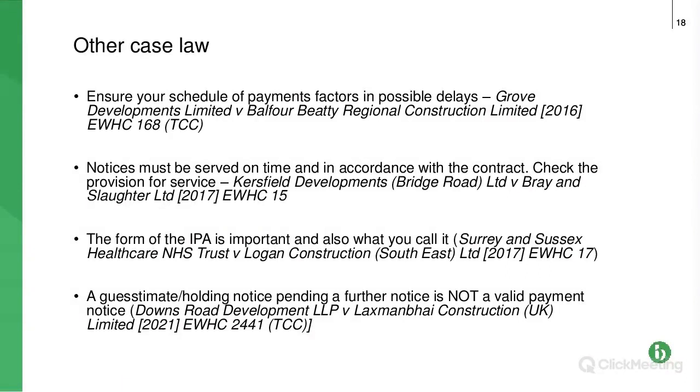Now, I guess if the further payment notice had certified 1.6 million out of the 1.8, the contractor might have been happy, because that was the sum that would be paid. But they weren't happy with the subsequent payment notice. They took it to court, and the court said that subsequent payment notice is invalid, it's out of time. So all we can look at is the first one. And the court there said that it was invalid because it didn't state the sum that was due. If you remember, it's got to state the basis of calculation and the sum due.